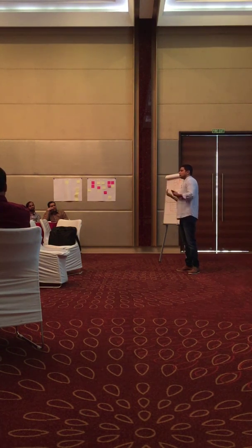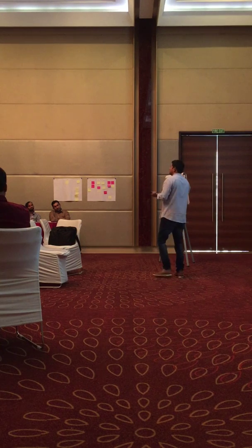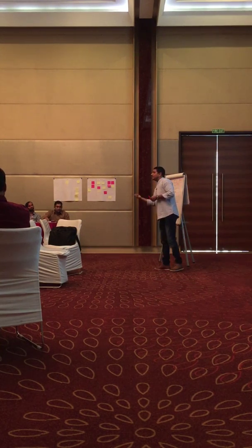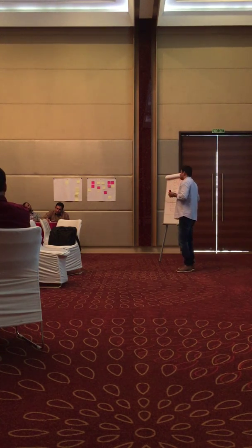One is input-output. As a mobile user, you can write one story. As a web user, or simple to complex. If it is really complex, first identify the simplest things you can do. Then increase the complexity going forward, right? And CRUD, C-R-U-D, create, read, update, delete, right? But whenever you are doing a split, please ensure the 3C concept and the INVEST principle are met.